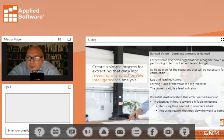So instead of thinking about, I've got to get to 100% DD by 3 months from now, okay, what are the incremental steps to get there? Okay, well, we have to produce the exterior package, or we've got to do all the layouts for the area calculations and all those kinds of things. All right, so those start to be smaller, more manageable tasks that have some times, right? And so that's where we can start to connect in things like, on our weekly updates, project coordination, maybe we're talking about these packages and percent complete.